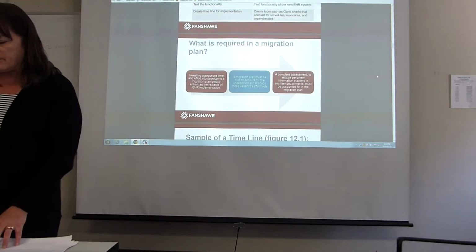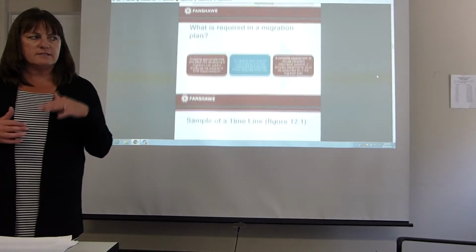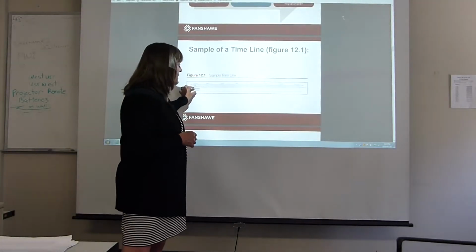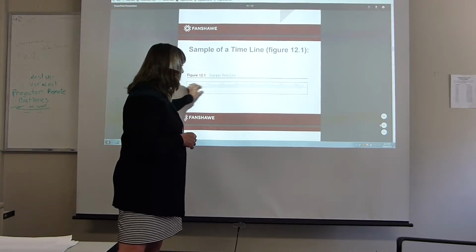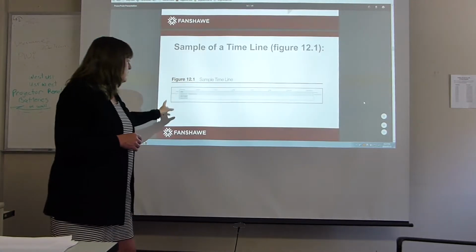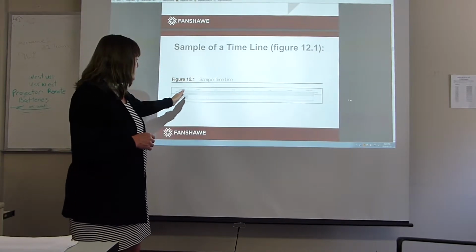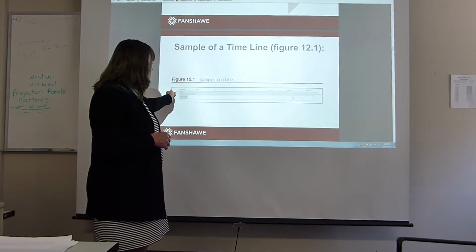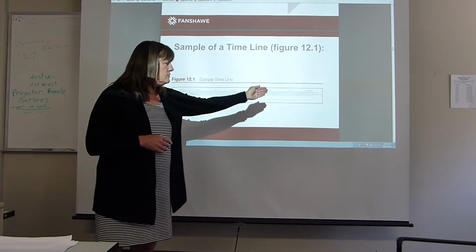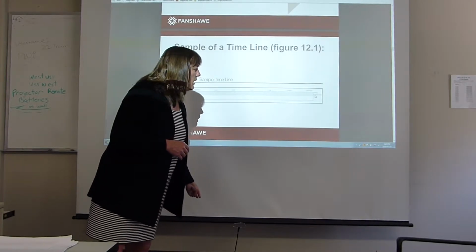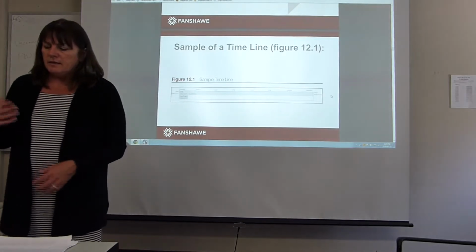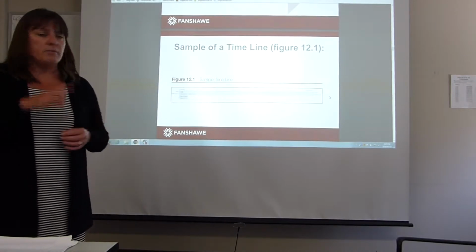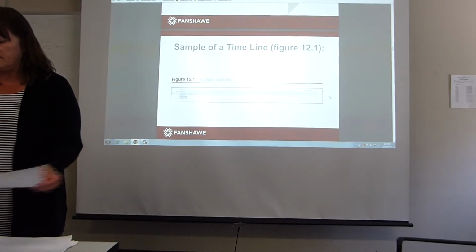In terms of a Gantt chart and a simple timeline with a Gantt chart, next slide please. Here is an example of one where you would have the task that needs to be completed, and very similar to a bar graph, it would just indicate how long it will take for that task to be completed. So with this one EHR project proposal, it was going to be taking from February to the finish time of September, looks like September the 13th. And again, if there was a dependency, that one would be attached to another line item and would indicate that dependency.